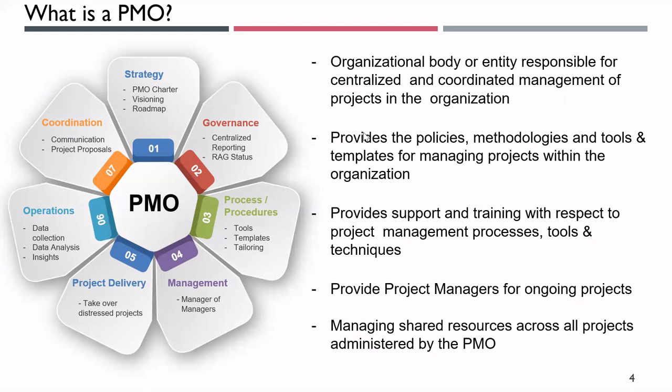The third and equally important element is that this is a body which is going to establish processes, policies, and procedures related to project management. So for any new tool rollout, let us say a new tool has to be evaluated for capturing project data, the PMO would be the body instrumental in using that tool. They will first use that tool internally, pick a few projects for a pilot, and then, based on the pilot results, take a go or no-go call. We may not do a big bang rollout across the entire organization, but for a few categories of projects that fall in a particular zone, this tool might be beneficial.